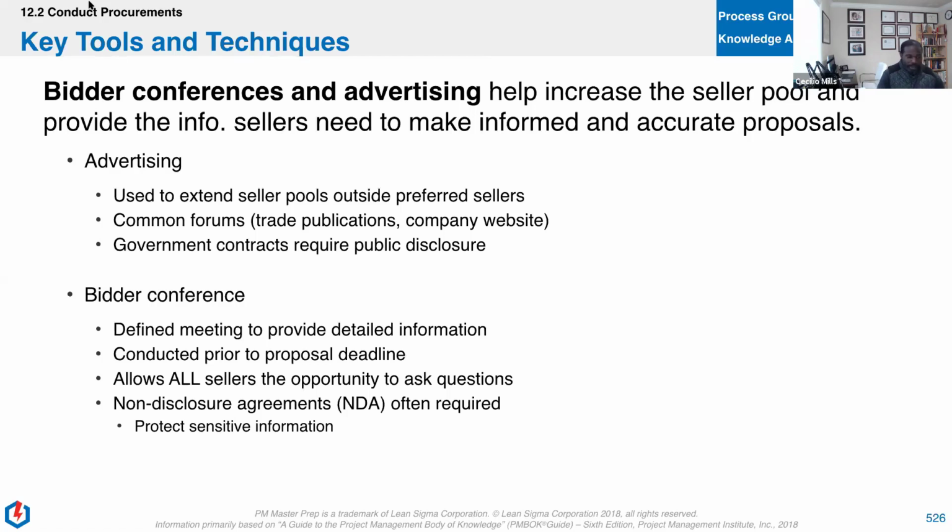So we come in, and it allows all the prospective vendors and contractors to show up and ask me questions about the RFP. I shouldn't say statement of work at this point. They'll ask me questions about the design, about the delivery, what they can and can't do. And I may not even answer the questions that day. I may take everybody's questions, go back to my team, and strategically answer them because we want to make sure we get the best deal. But then we send the answers out to everyone, regardless of who asked the question. Even if you ask no questions, you will get all of the responses.